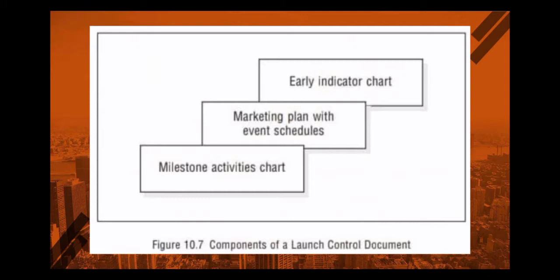The milestone activities chart lists the desired dates of completion for significant activities such as purchasing equipment for the launch, finalizing package design, obtaining legal clearance, subcontracting specialized labor, and preparing the owner's manual. Each of these may require several steps and may vary in importance depending on the project. Their potential impact on product success must be considered in assessing priority. For example, electronic or high-tech consumer products require clarity in technical documentation to be successful. Customers are increasingly seeking simplicity in a complicated world.